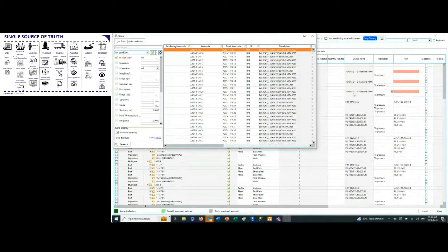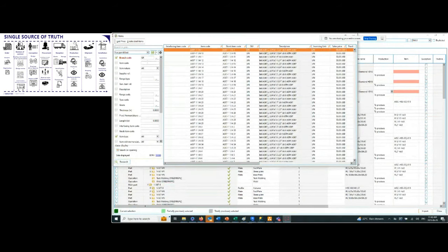The reason why we leave it up to the user to manage the mapping is because you can have, for example, for a plate thickness of 1 inch, many different sheet sizes that you purchase typically from a vendor. There can be 4x8, 5x10s that are 1 inch thick. And sometimes to save on cost, you might even ask your vendor for offcuts, right? To see if they have any available to reduce the price. So this is why the association of mapping is done by the user and saved in the mapping process, which is typical for these types of solutions in the first place, but just to mention.